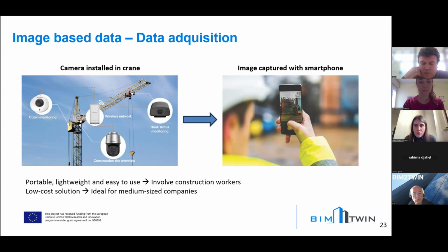We decided to do this because smartphones are accessible and easy-to-use devices, where anyone can use a mobile phone to capture data without requiring specialized training. We also wanted to try a new workflow involving the construction workers in the progress monitoring, without the need for specialized persons to capture the data. So construction workers must capture photographs at the end of their workday or at the end of the task and upload them to the server where the progress monitoring web platform is installed.